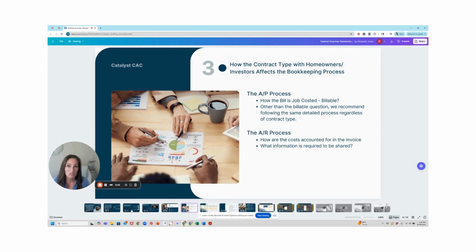If you are a lump sum, fixed price lump sum contract, then you can lump it all on one line item, or you can progressively invoice a percentage of each cost code. However you want to do it, you do not need to go actual cost by actual cost. So you have a lot more freedom in invoicing how much you invoice and when. However, like I said, we want to cost exactly the same so we still know exactly what our actual costs are, but we have a lot of freedom in the accounts receivable to present that draw however we want to.